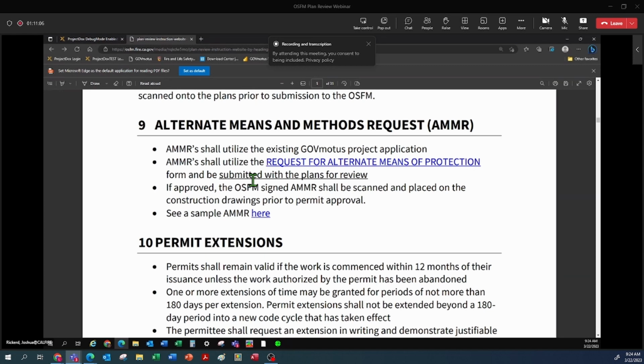Going to go ahead and take some more questions. We have a question about photovoltaic canopies and systems. Okay for deferred submittal? No, we don't allow them to be deferred. They have electrical work, which is a required element to be reviewed. They can be their own submittal. They're not deferred technically. But if you want to make them a separate aspect of the project, a different project entirely, you could do that. But we do not defer photovoltaics from a project.